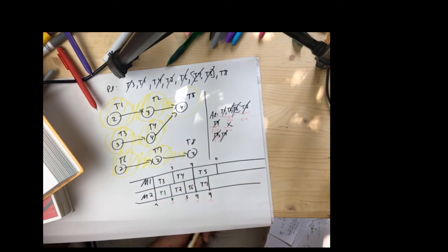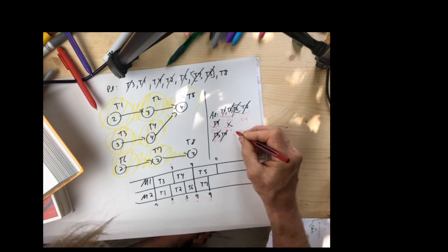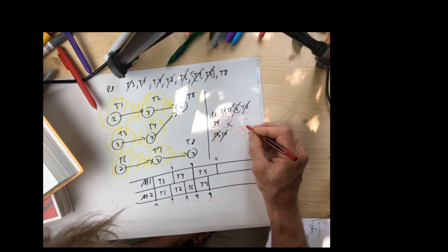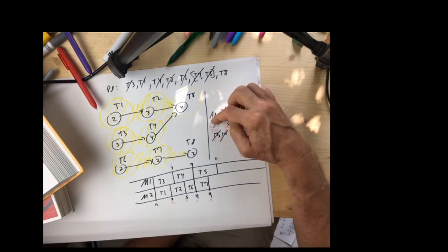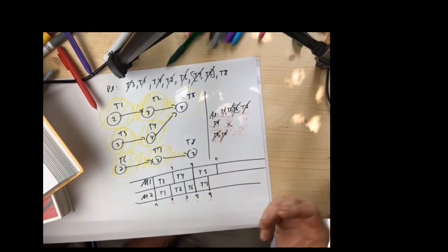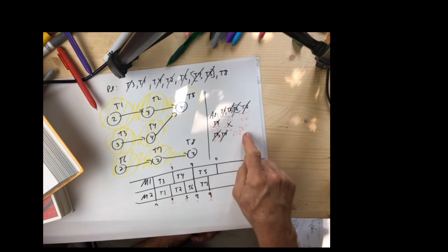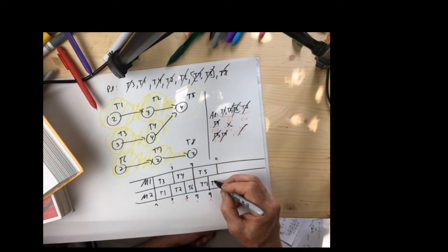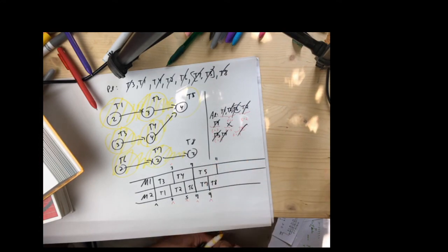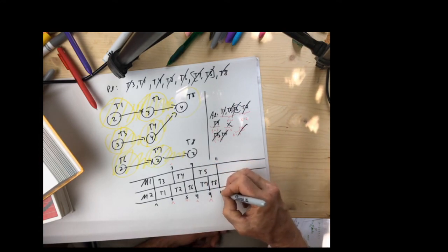and we have reached time equals 9. And that is the last of all jobs possible to be available. 1, 2, 3, 4, 5, 6, 7, 8. There's 8 jobs. We've reached the end of really doing things. 1 person, 1 job. Don't worry about the priority list, but we're going to do all the updates. Runs for 2. 9 plus 2 is 11.